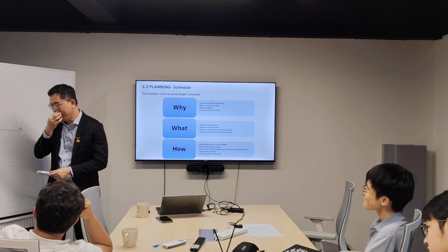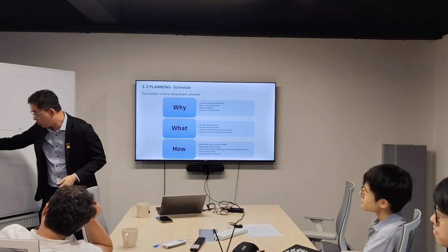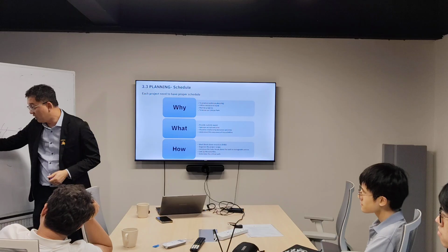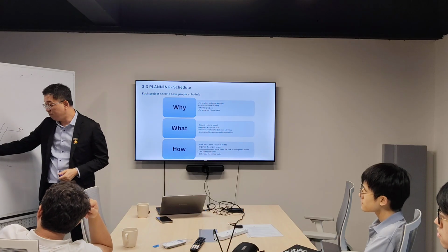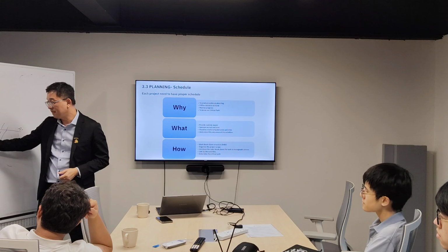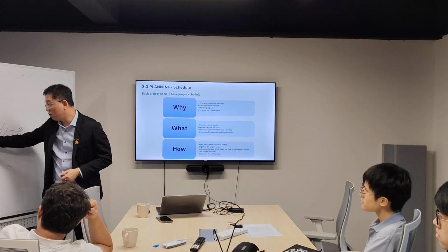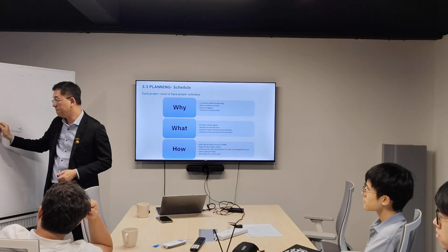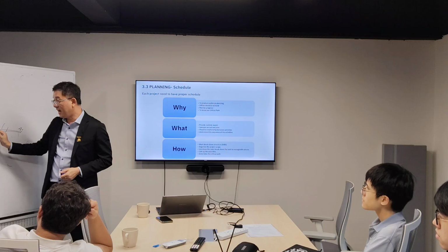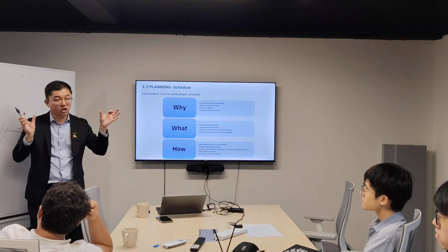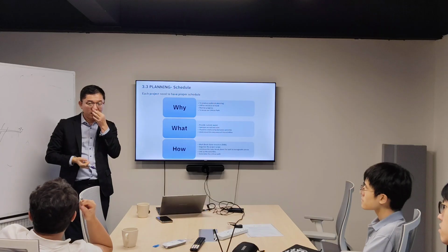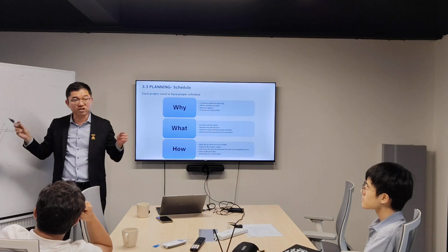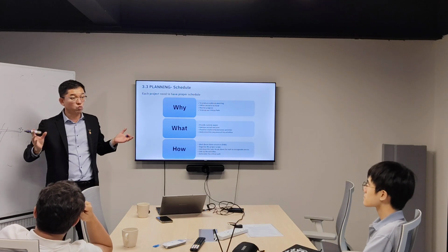Impossible, right? So the sequence will be: we need to excavate the earth first, and then build the footing, column stump, backfill, and then build the column, beam, slab, build all the so-called skeleton of the building, and only then build the roof and the skin of the building, which is the wall.